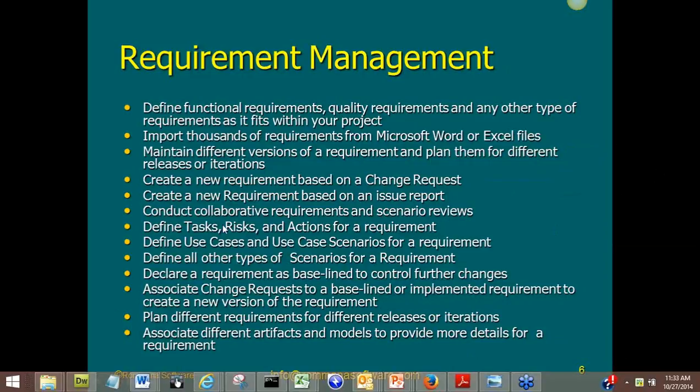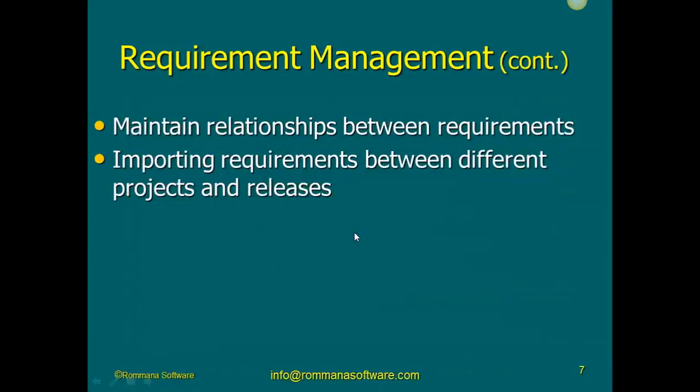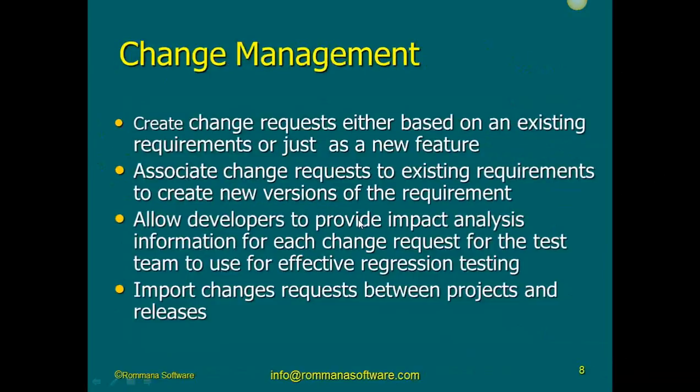Of course, every project has risks, but those risks are associated with specific requirements. And you always have to associate risks with it. A requirement that's written there with nothing associated with it is not enough for me. I have to know what kind of risks I have in delivering this requirement. Am I going to be able to deliver this requirement? Or is there a possible thing that could happen in my project in which case I could not deliver that requirement? I guess this is a lot of things to say about requirement management. I need just to move to talk about change management.